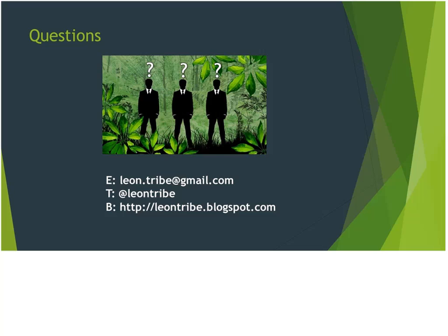But yeah, if you're looking to do that, I'd be looking at the areas and iterations and setting those up in a sensible way to manage your projects, if you're doing multiple solutions for the one grand CRM project. Those are hierarchical, so you should be able to work something out without it being too difficult. The areas have a tree structure to them, and the iterations do as well. So there's no reason why you couldn't have two solutions in, say, the area, and underneath those have the different sub-areas, if you like, for each one of those solutions.